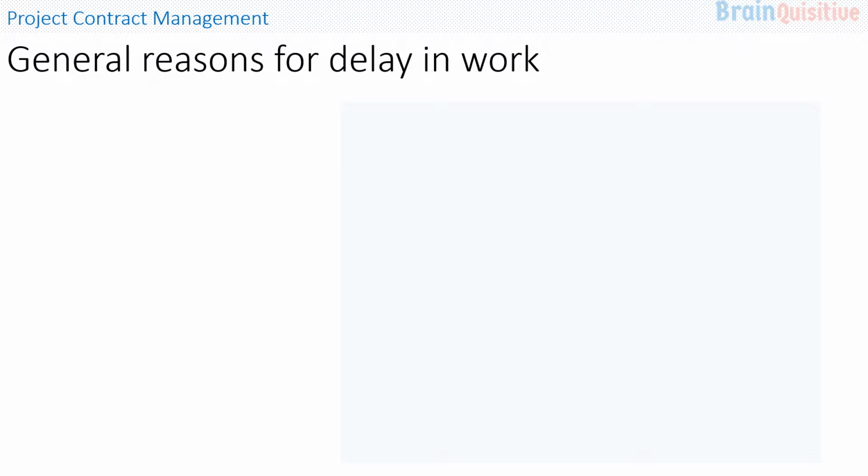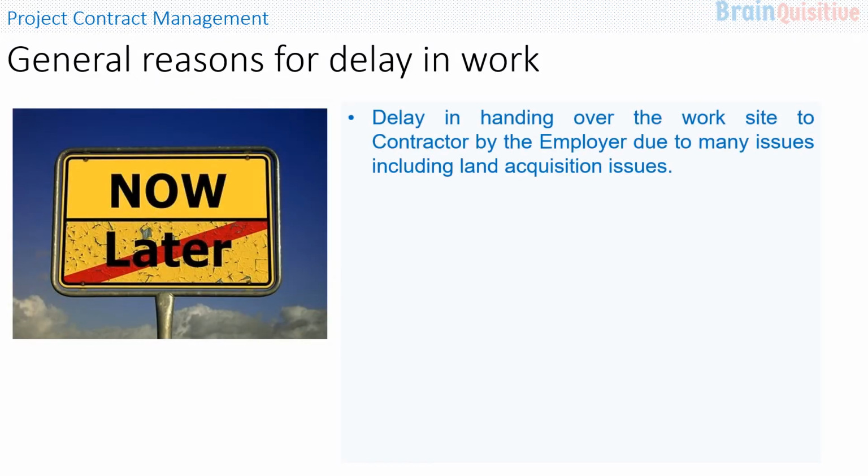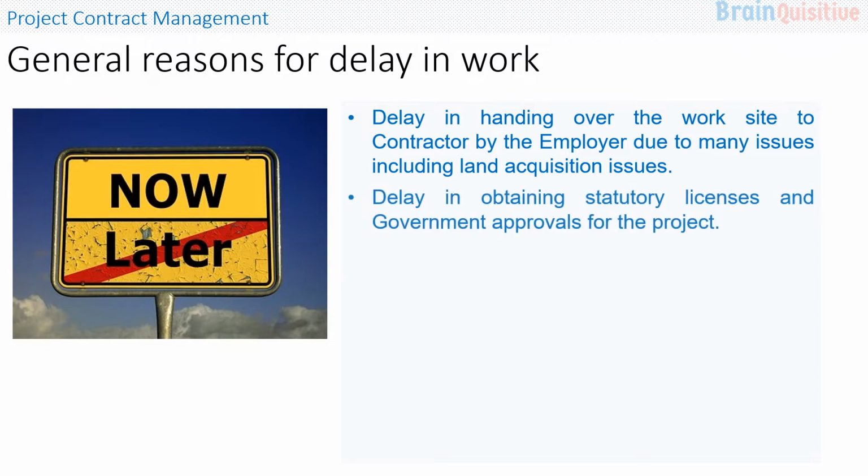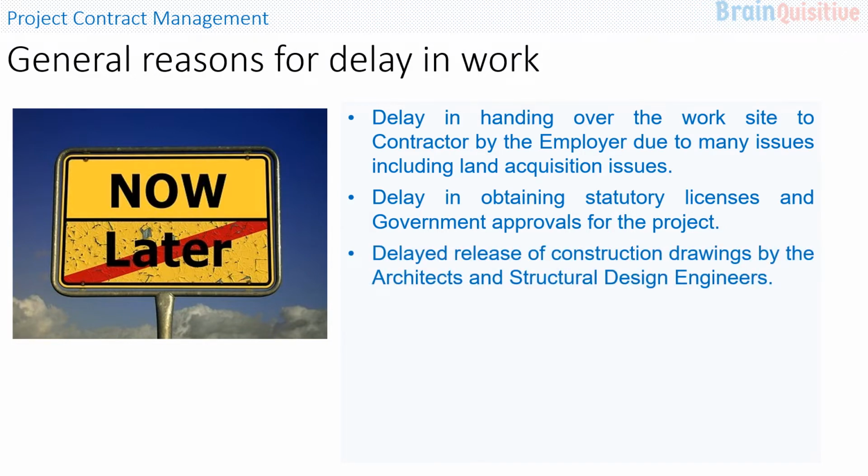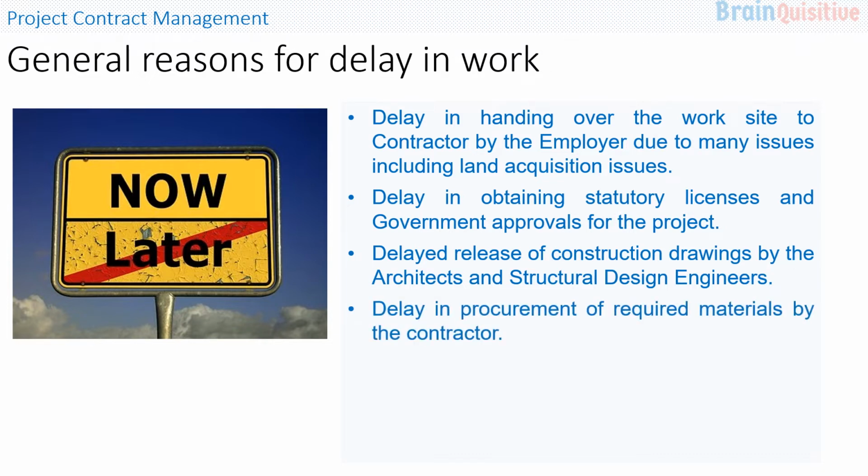The general reasons for delay in work are the delay in handing over of the work site to the contractor by the employer due to many issues, including the land acquisition issues, delay in obtaining the statutory licensing and government approvals for the project, delayed release of the construction drawings by which the architects and structural design engineers make a delay to the project,